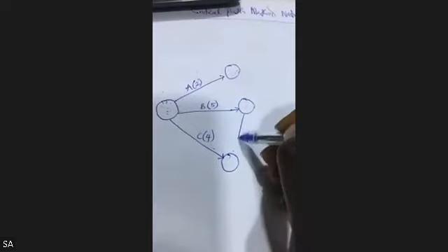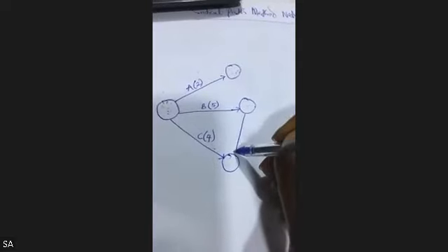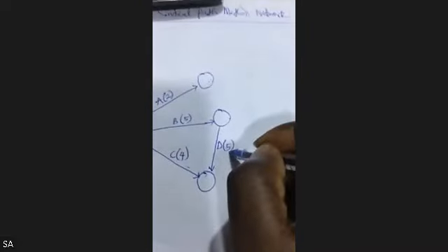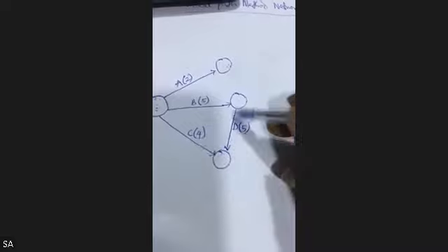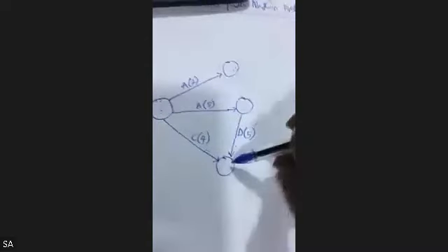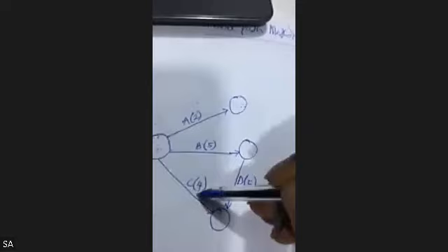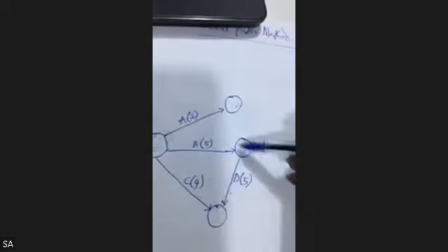So my D will come towards like this. Please pay attention now. So this is D. What is the activity duration for D? It's 5. So I put 5 here. So you can see C and D must happen from B. Before D happens, B must happen, C must happen, and C and D must have the same ending node. That's why you see C and D have the same ending node. They point toward the same direction. So having done that, we'll go again.